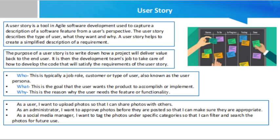There are some common mistakes when working with user stories: starting from a requirement document created in a non-agile way and ending up with contrived stories; adding details and requirements too soon — stories about to be implemented need the greatest level of detail and clarity, stories coming up soon can do with less, and stories more than two or three iterations out don't need any; and not having a conversation about the story with everyone concerned — customers, users, developers, testers, and business professionals — before you start implementation. This conversation is essential to collaboratively add the details and acceptance criteria that will prevent rework.